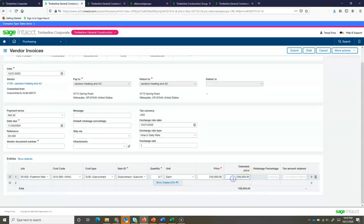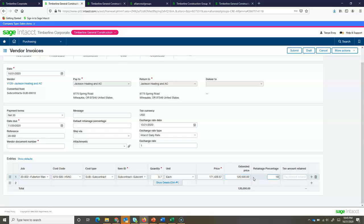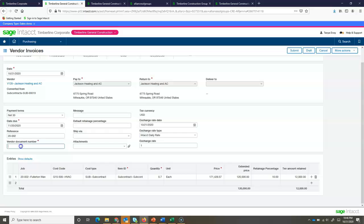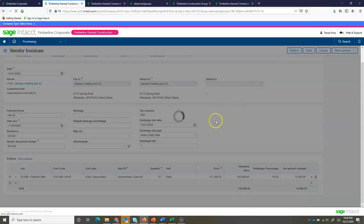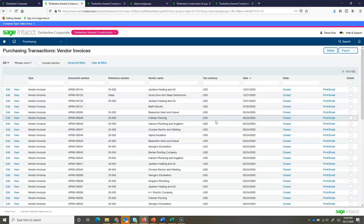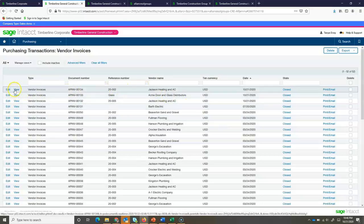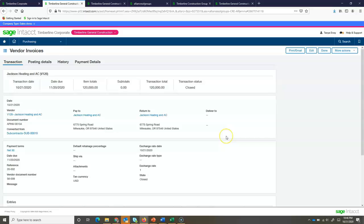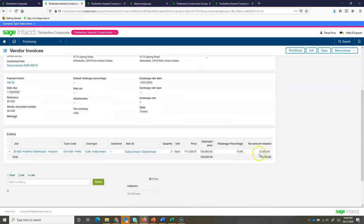So, maybe we got an invoice for $120,000. We can then enter in, if it's different, our retainage. And now it's going to calculate the retainage amount. I can enter in our invoice number from our subcontractor and I can go ahead and submit this. Now, again, if I drill back into my accounts payable invoice, I can see the amount that was held in retainage and the original invoice amount.